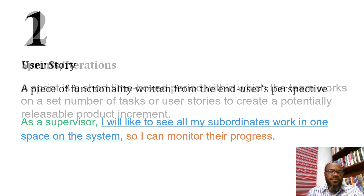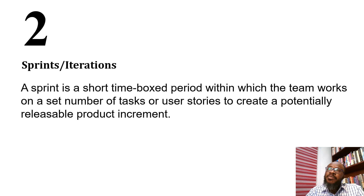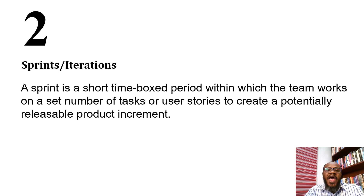The next concept is a sprint. Sprint and iterations are often used interchangeably. A sprint is a short time-boxed period within which the team works on a set number of tasks or user stories to create a potentially releasable product increment. On agile projects, deliverables are broken down, and one of the granular levels is a sprint, which ultimately contains a set of user stories.